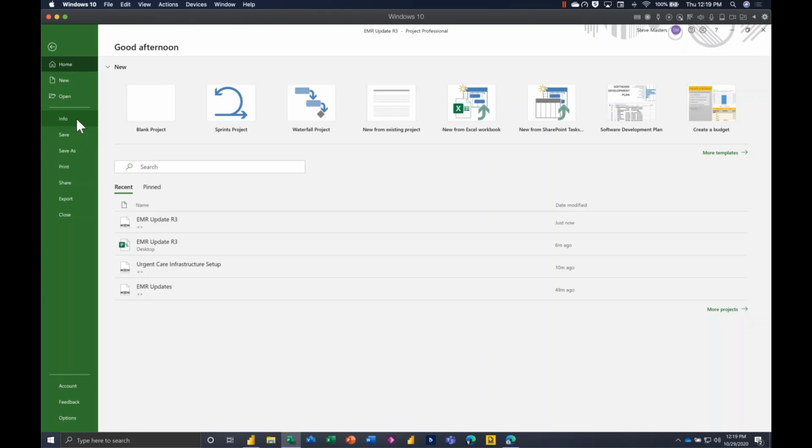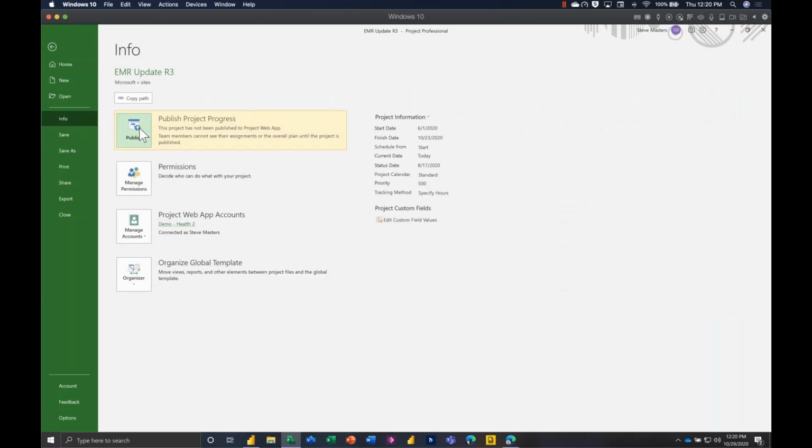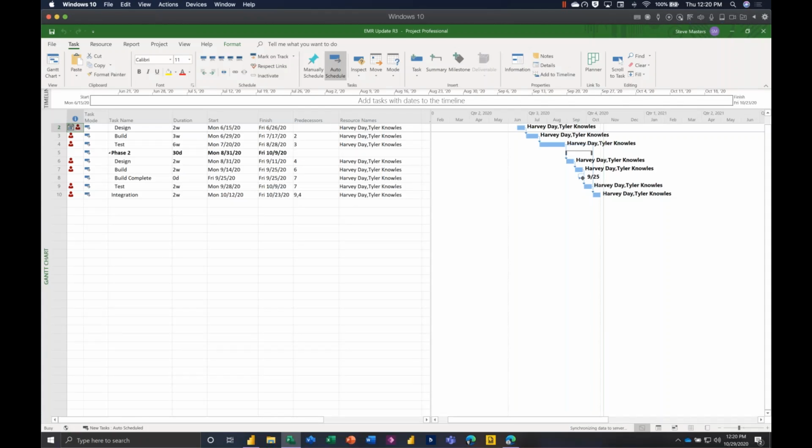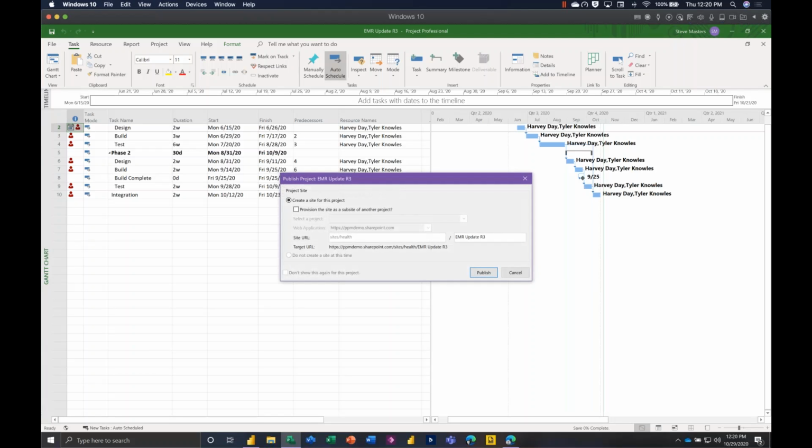What's the difference? Why do I have to save and publish? Well, the idea here is that if you save a project, you can just save your version of the world, and you can then make iterations and updates, what if modeling, do whatever you need to do before you publish the master version of your project for the rest of the world to see. So published projects are the ones that people can see through the online web experience, versus saved projects are just things that the project owner can see. Okay, so we saved it when we first imported. So we'll go ahead and now publish in order to make this project be visible online, and we'll move on